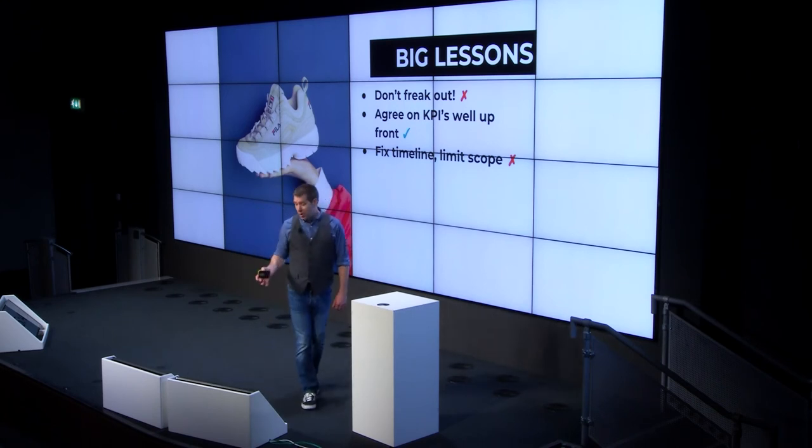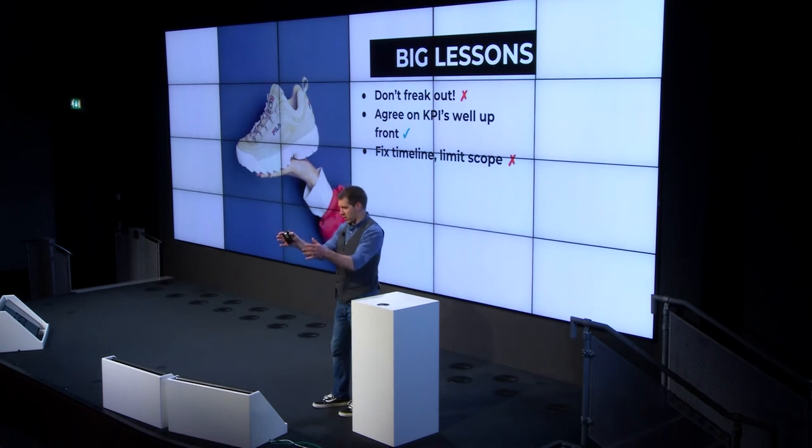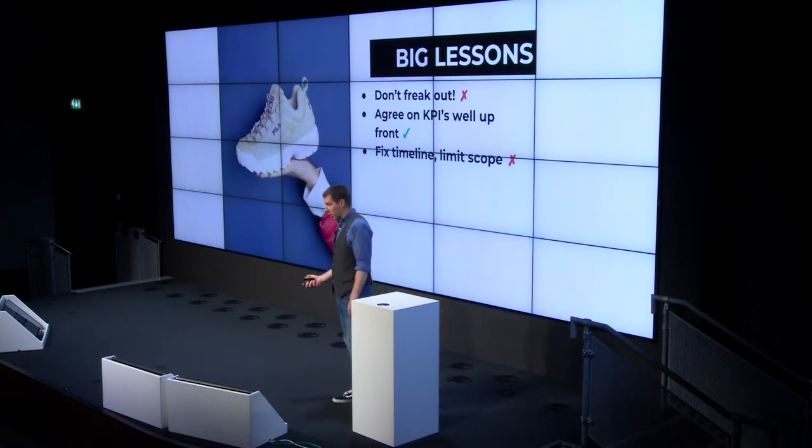What I didn't do, in terms of the whole design process, and what we should have done with the redesign, is say we need to be live then, we need this much testing, we'll need this much development time, and work backwards. We really just said, let's just start from now and see how we get on. But we kind of want it to be done for the summer. But it wasn't a solid project plan.